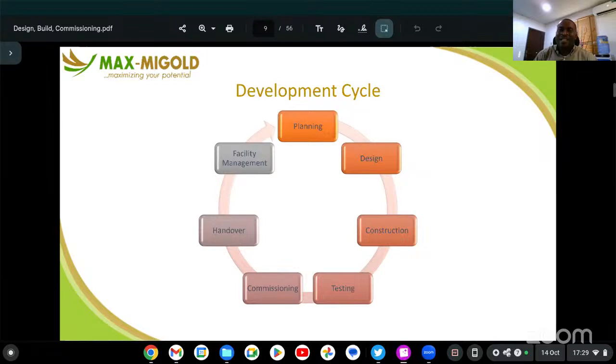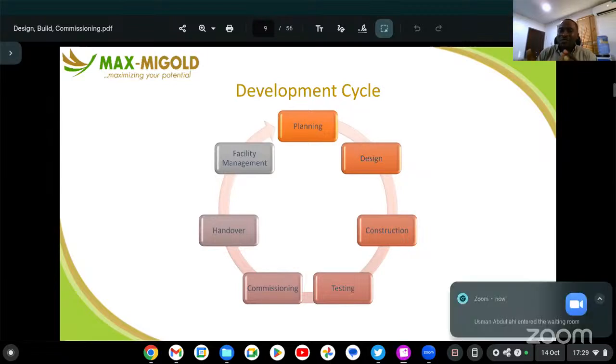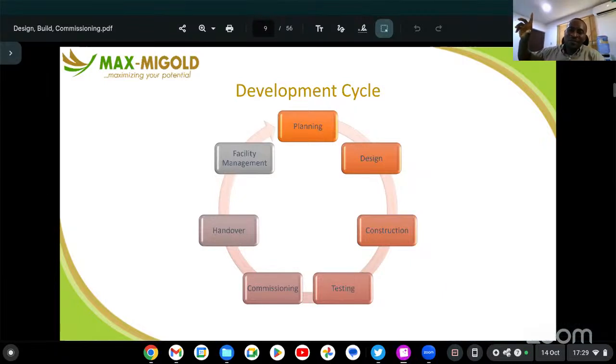So that's an issue already, and they need to address such issues. So there could be a change: instead of it being like probably 1 foot deep into the tank, let's raise it up a little to maybe 6 inches. So these are changes during construction, or during project management, that will need to be documented, approved, and checked if they really meet the intended standard.